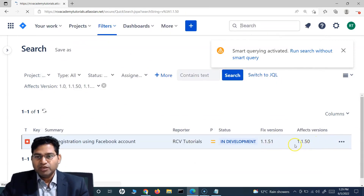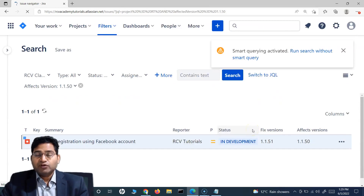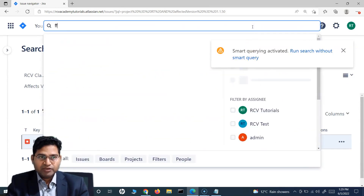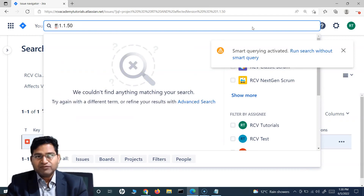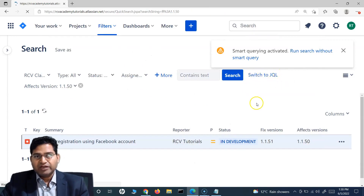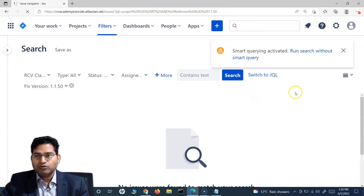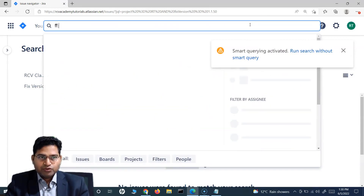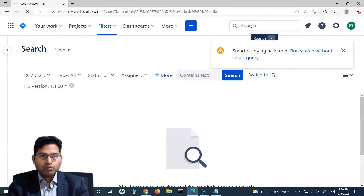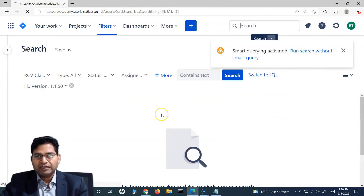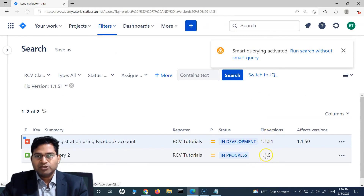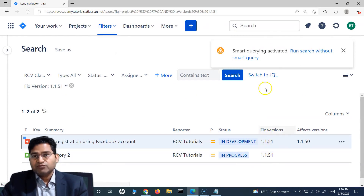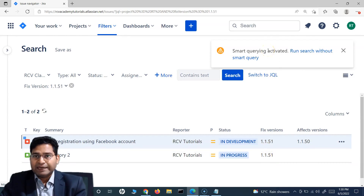Now, for the fixed version, the keyword is 'ff' followed by a colon and then the fixed version you are looking for. If I search 'ff:1.1.50' and enter, there are no issues with that fixed version, so nothing is displayed. But if I change it to 'ff:1.1.51', two issues — a defect and a story — are displayed. So for fixed version use 'ff:' and the version.